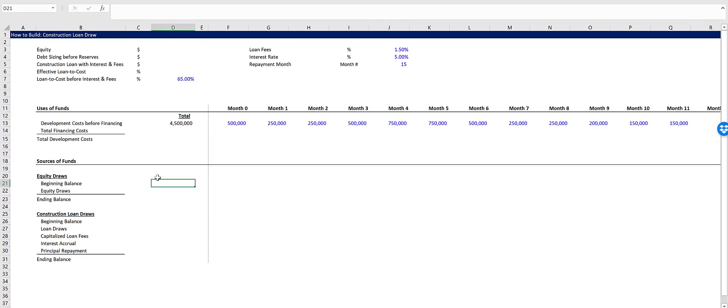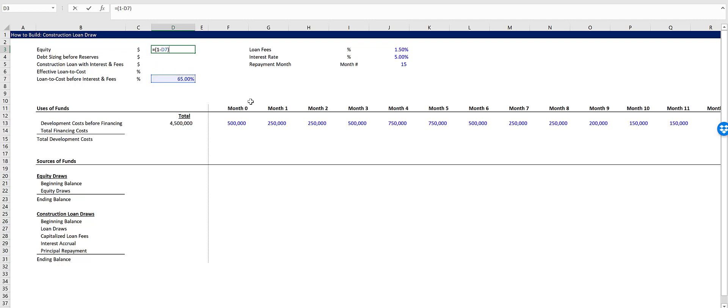Okay, so let's start with our equity draws. We need to estimate how much equity we're going to need for the deal. To do that, let's take 1 minus 65 percent, so that's going to be 35 percent, and we'll multiply that times the development cost before financing.